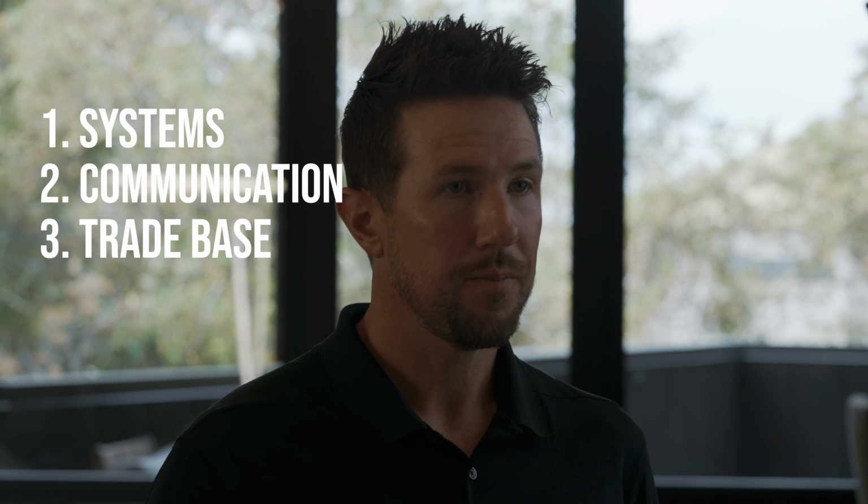The third thing is trade base, the doers of the project. So about 60% of your budget is actually related to the installation of the home. Materials are a certain percentage, maybe 30, maybe 40%, and the trade base is the other 60%. So it's really important to be very clear on the level of quality in the expectation. The builder's job is to align the quality with the doers and the resources. So once the doers are set up, we call that a trade base. Then we can execute on the vision of the plan. So now we know what we're executing. That's a really important step to communicate: expectations, and aligning those with who is doing the work.